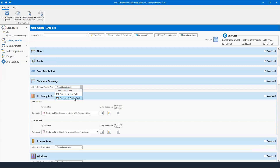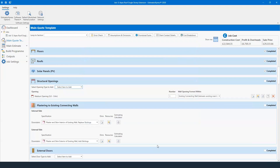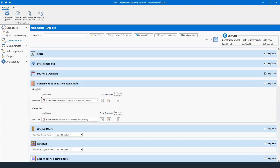Structural openings — we can create them going into an existing wall. A medium opening of about three meters: three meters in width, 2.1 meters to the underside of the sill, 150mm end bearing at either end, yes or no to padstones, and then our plastering options. Once happy, we confirm back-wall plastering. We now have two sides of this existing wall — the internal side (e.g., kitchen side of a knock-through) and the external side. We've got plaster and skim the interior of the existing wall, replace the skirting on the inside, and plaster and skim the exterior of the existing wall.